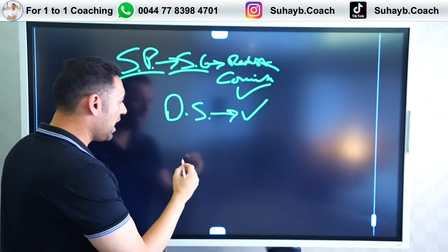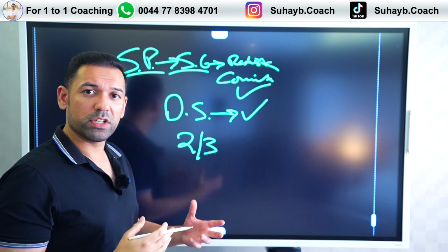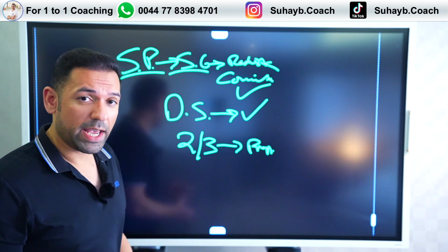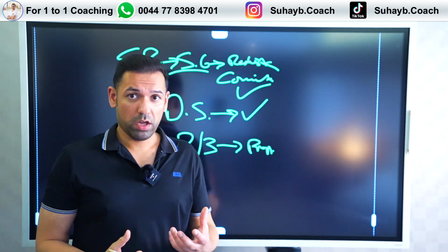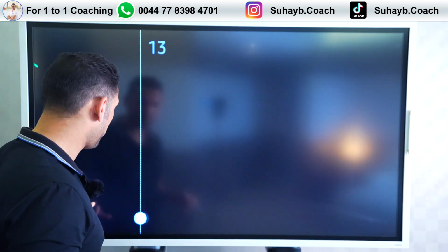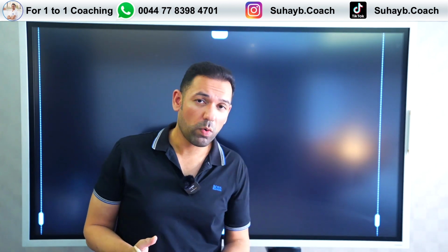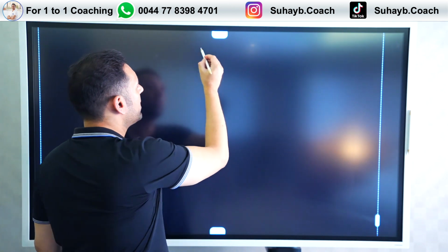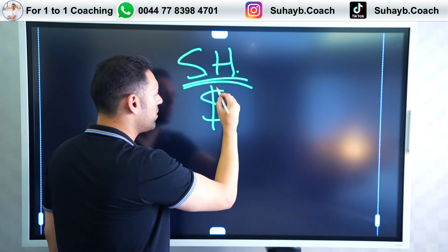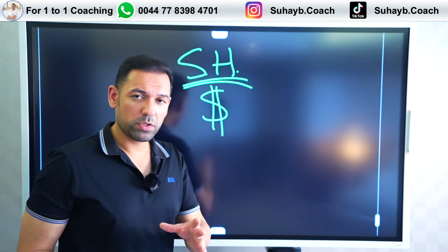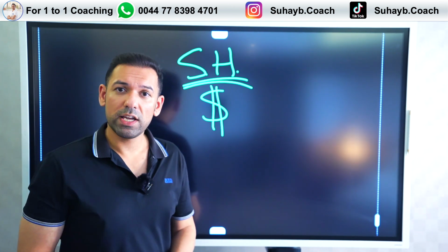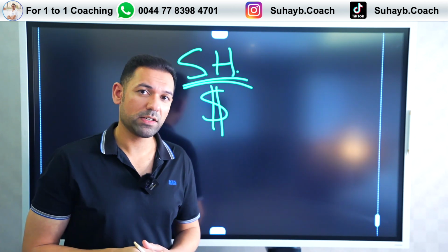But critically, about 2 to 3 days before the sprint review, you need to actually start prepping. Yes, despite what the guides say, despite what some of the methodologies are saying, you actually need to prep. And I'll tell you why. It's a very simple thing. We live in a practical world, a world whereby we have stakeholders. Stakeholders want to see value for their money. And if you're unable to deliver value for their money, you will be questioned in terms of what value you are bringing.